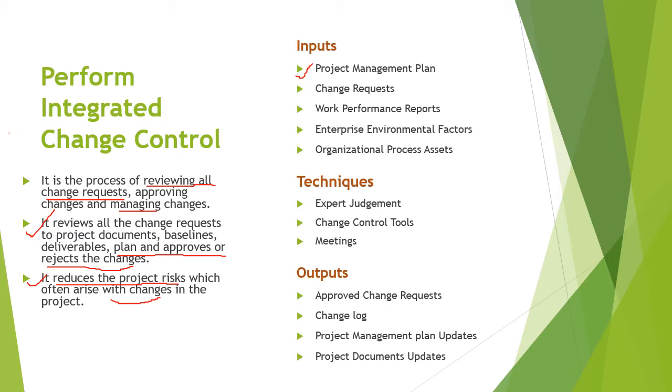scope baseline, or I would say all the baselines: scope baseline, cost, and schedule baselines, right? Scope baseline is important because it provides you the product definition. It provides you a definition of what is going to be the final outcome of the project.